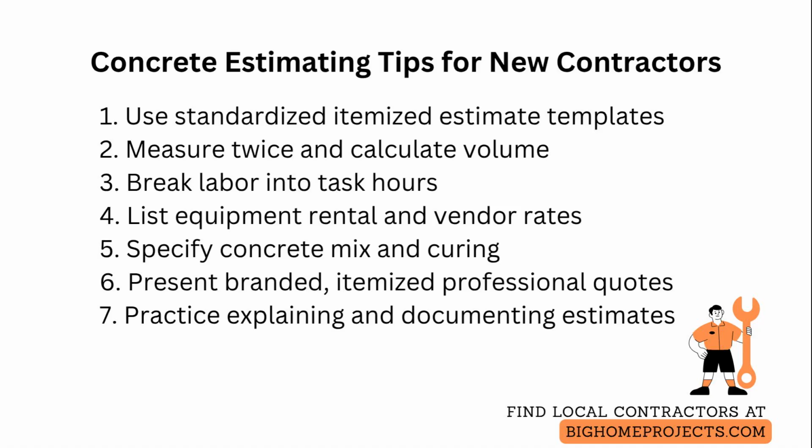Measure twice and record dimensions in writing, then calculate volumes using length times width times depth, and convert to cubic yards by dividing by 27, rounding up to account for waste and minor changes.